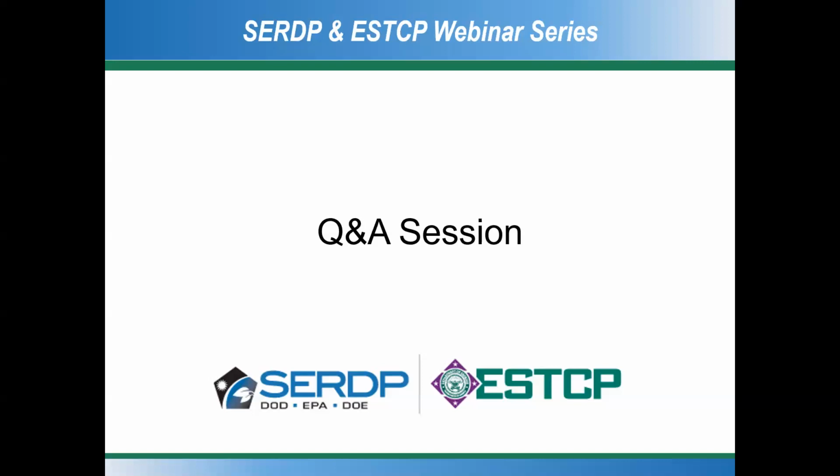Thank you. How did the price of frequency regulation change during the course of the project? Did you track that? Yeah, I mean, frequency regulation is difficult. The way that the compensation is determined is fairly complicated. It's not like you pay X cents per kilowatt, like demand or capacity payments. We didn't have constant ongoing knowledge of how it was varying, but when we started the project, we expected that the revenue associated with frequency regulation would be in the range of $300,000 to $400,000 a year, and when we completed the project, it had gone down to $200,000 to $300,000 a year.